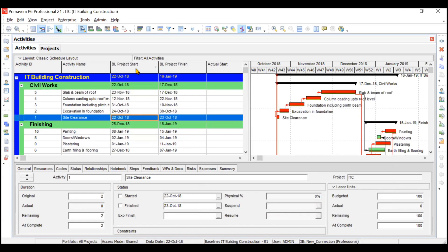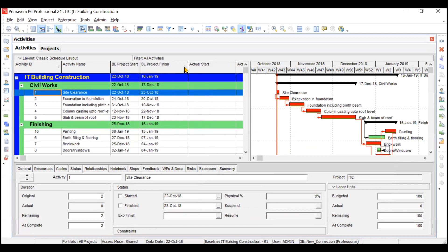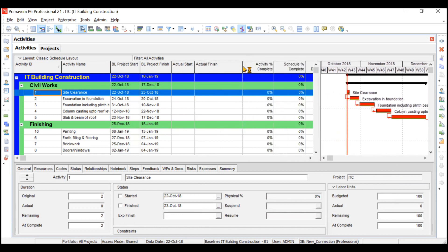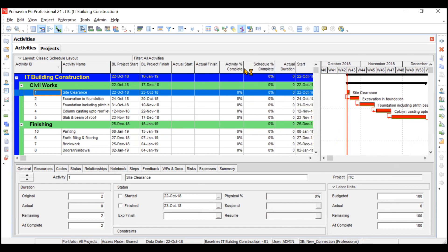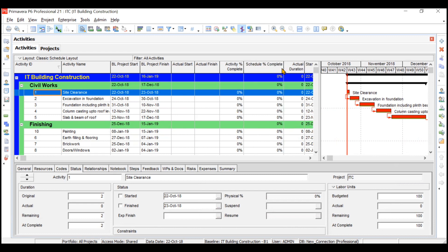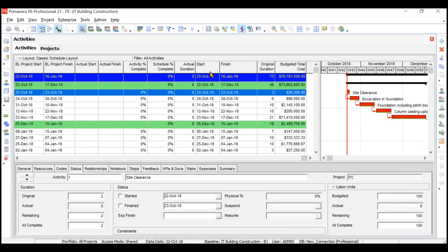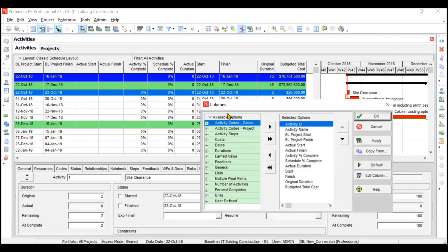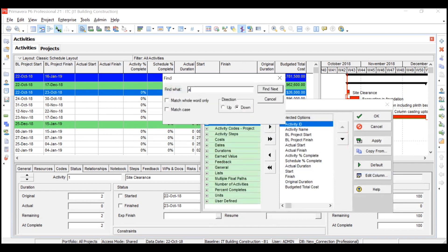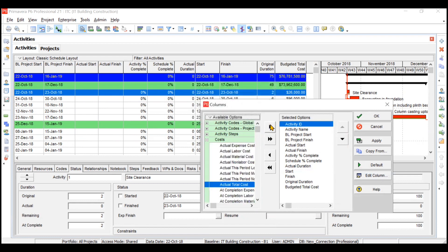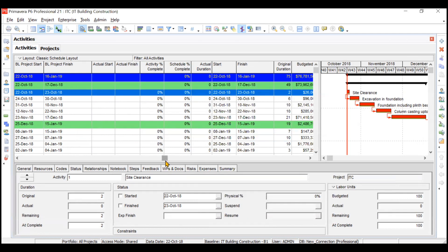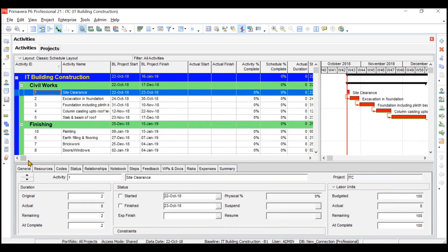After clicking OK, all changes are applied. You can change the width of columns so more data is visible. Right now Actual Start and Actual Finish are empty because you haven't updated when activities actually started or finished. Activity Percentage Complete and Schedule Percentage Complete are also showing zero — they will update when you update the progress. You can also add the Actual Total Cost column, since Budgeted Total Cost is already there. Move it to the end and click OK.